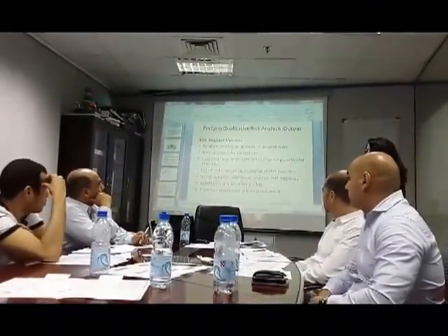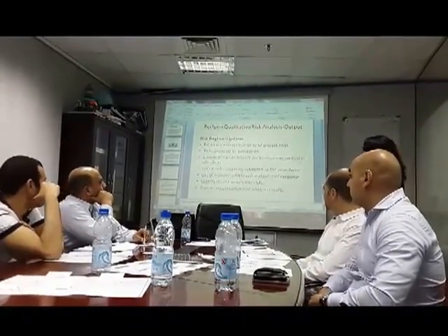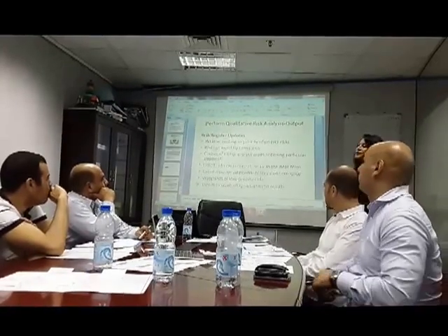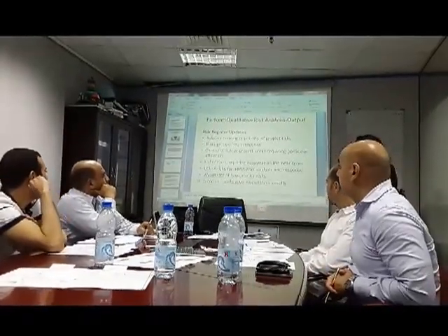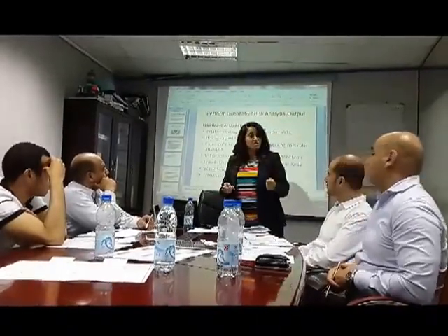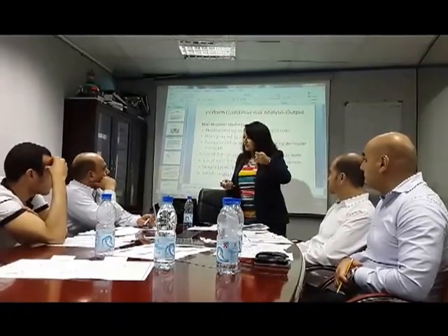Whenever we send a risk to the quantitative analysis, we have to document this in the risk register. So this is an update. We have our watch lists of low priority risks. As I said, when you have risks of very low priority, you put them on a watch list. Whenever you put a risk on the watch list, this is also updating the risk register.